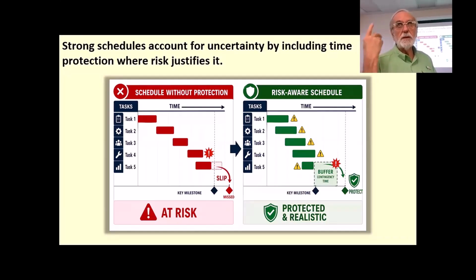So you go back: it's got to leave the port somewhere in China, because they were developing them in Shenzhen, where they were assembling the calculators. Then you think, we have to have all of them in the boxes, and that takes 30 days. So you back up and you keep backing up.